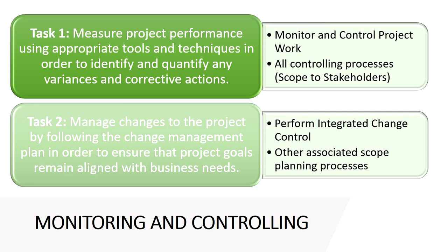You got to look for it, the approved change request review, as a tool and technique, a sub-tool and technique there. And you have to understand that as you get a revised deliverable, it needs to be checked against the approved change request. And if it passes the test, then you update the change log with information that relates to that.